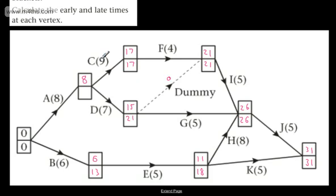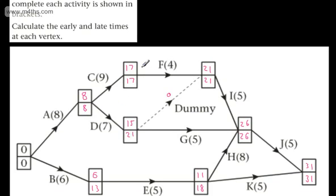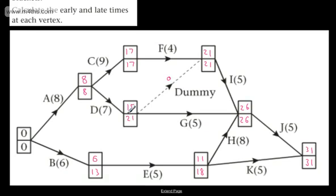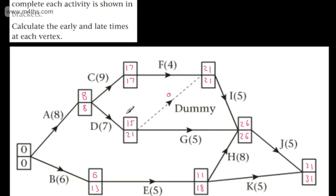Continuing the back pass: we get nine here, and working back with eight takes us to the source node, which will always be zero. On the back pass we're finding the lowest number, whereas on the forward pass we found the highest. I is dependent on D and F, which means we take the larger value on the forward pass as both must be completed before I. This is just working through your early and late event times. In the next video we'll go on to float, and then we'll look at critical activities and critical paths.